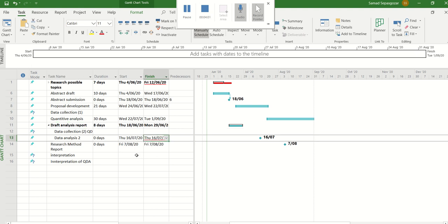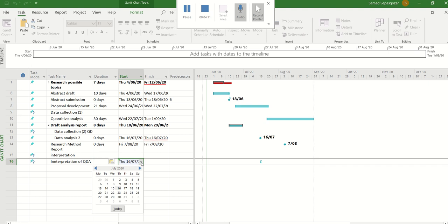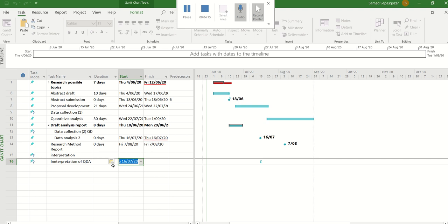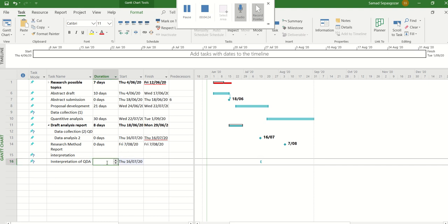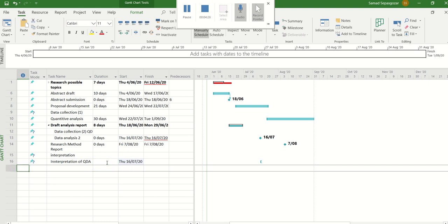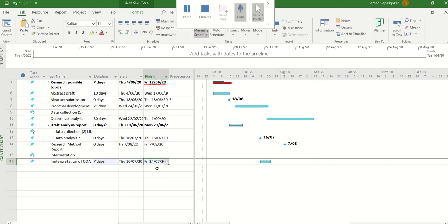So you can see, okay, this figure. Here you can see the date is going to be, for example, 16 of June. So that's your start date. You need to say how many days is going to be the duration of this task, maybe seven days, one week. Sorry, here, seven days. So when you say seven, then the finish time will be automatically calculated. So you will have the finish time here.